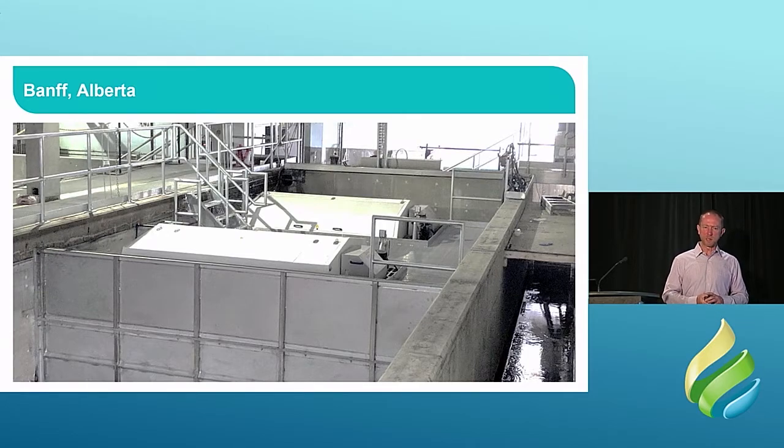This is how the installation looked. Not a whole lot to see there. Something a little unusual on this project is they put in a steel wall. They did that because the municipality wanted the project to go at a very, very fast pace. It was done as a design build, and the contractor was incentivized to have this thing offline for as little possible time. So that's why they put in a steel wall.